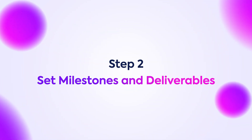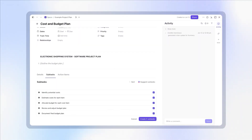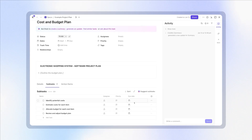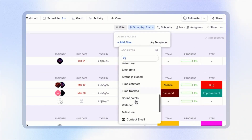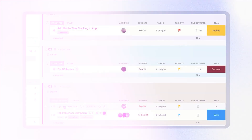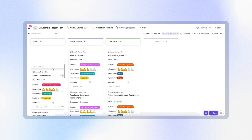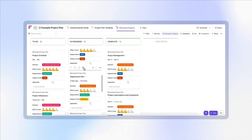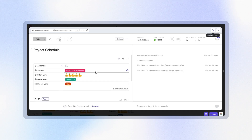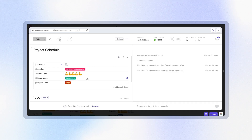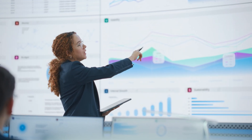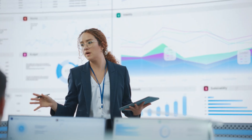Step two is adding milestones and breaking down the deliverables. Now that your team is aligned on goals and scope, it's time to break the project down into specific deliverables and milestones. In ClickUp, you can create tasks for each key deliverable and mark milestones to track major checkpoints. You can use custom fields like impact level, department, priority, or effort estimate to give more context to each individual task. This makes it so much easier to spot what's at risk or behind schedule and keeps momentum moving throughout the project.